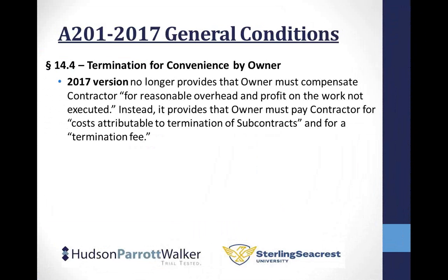And this is what everybody who's taking notes needs to write down. This is a new requirement for your checklist of what you need to be doing, which is you need to put a termination fee into your contract. Why is this a good thing? Because a termination fee that is negotiated in a contract is absolute, subject to what I'll talk about LDs in a second, liquidated damages. But it is absolute. It's not something that's open for debate.